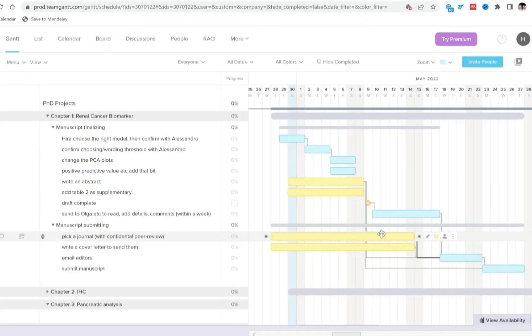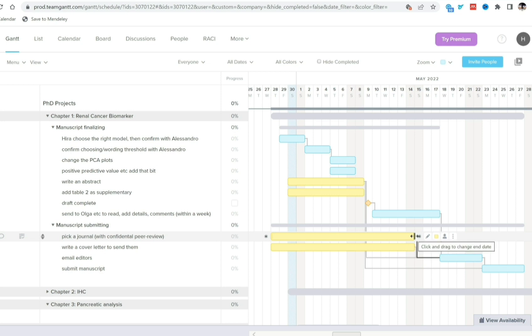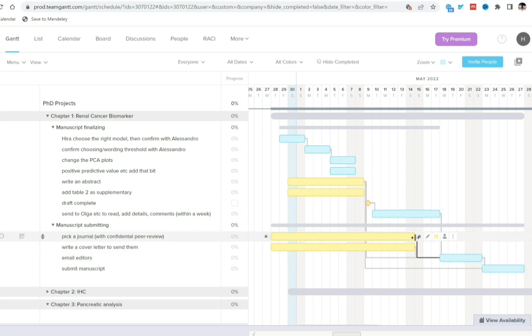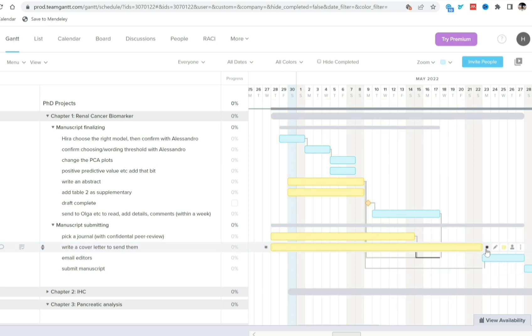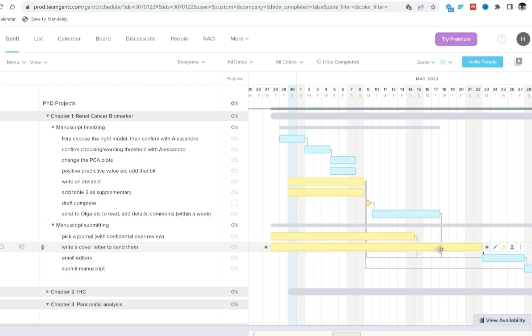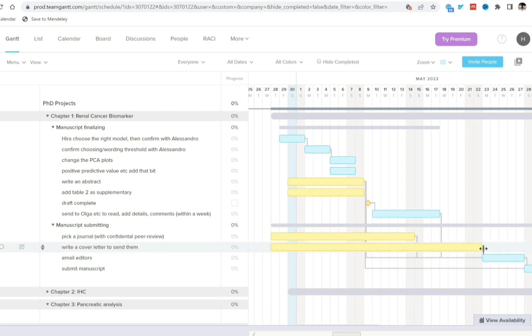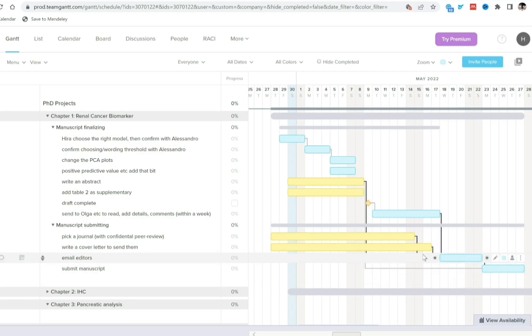The other reason this is really great is that you can see, for example, if I've got one task that is taking much longer than expected, it will automatically push all these other tasks forward. So I will very easily be able to see how much delaying one task is impacting my final end date because of how much it's delaying each downstream task. And so that's really easy, it gives you a lot of flexibility as well when you're planning. It also really helps me beat procrastination because then I can see how delaying individual tasks is impacting the final end date.